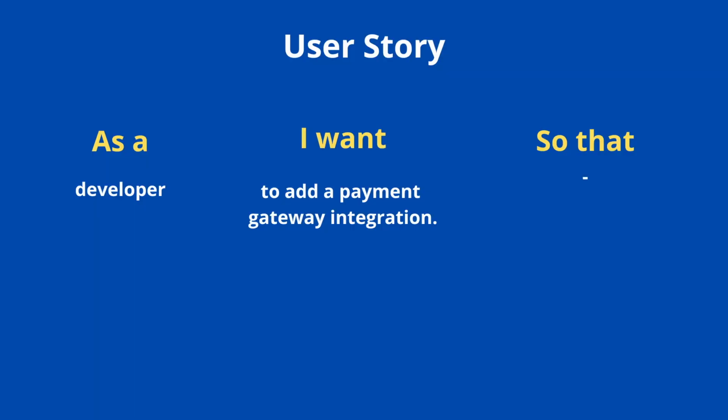As a developer, I want to add a payment gateway integration. What's wrong with this user story? Well, this user story is not from the user's perspective and it is highly technical. It focuses on the how part for the developer and not the why for the user.